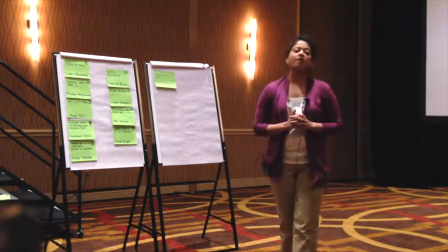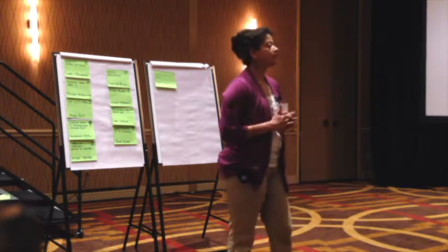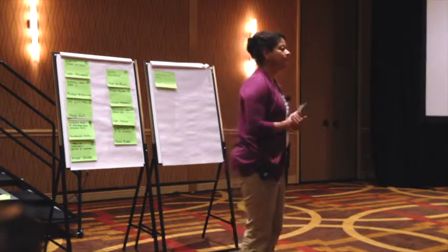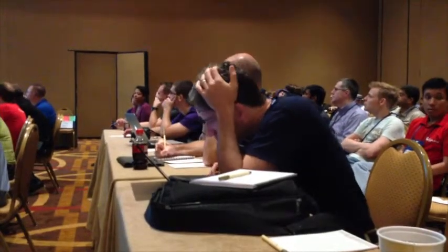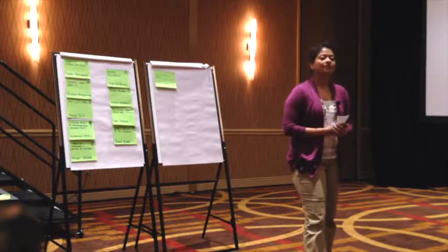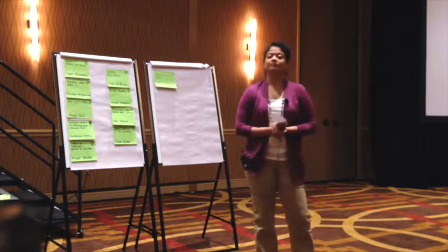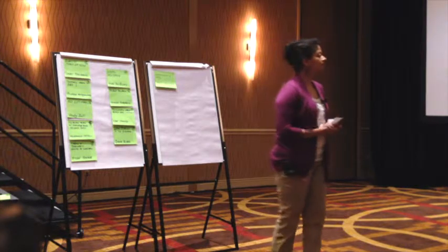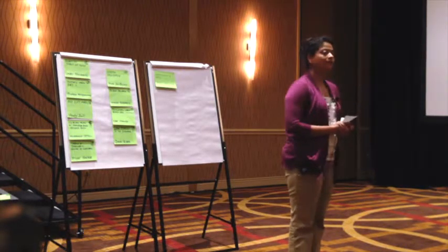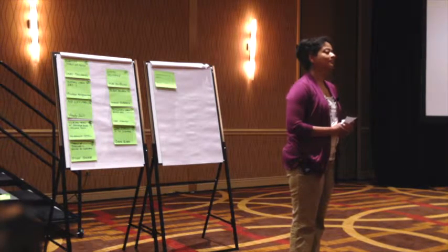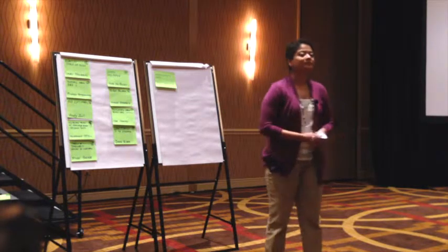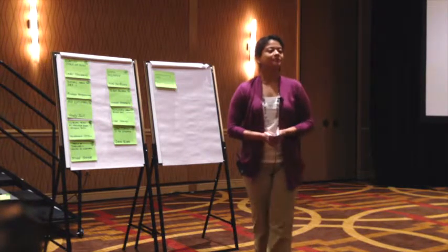Hopefully, the tasks are not going to span across multiple days, less than a day's worth of work. Once you do that, by end of day one, when you finish a task, you're also making sure it's tested. So there you go, testing on day one.